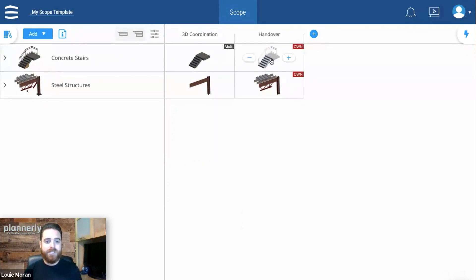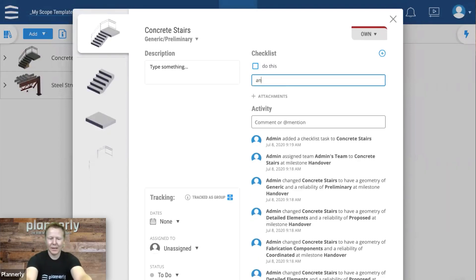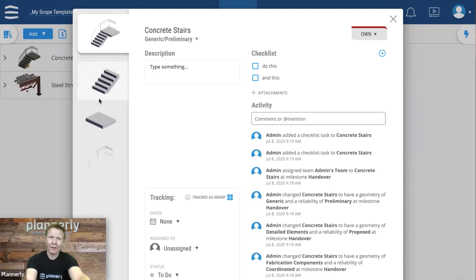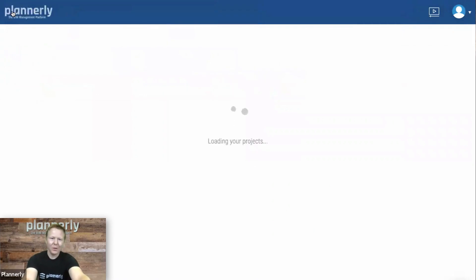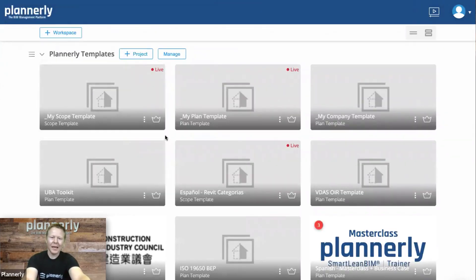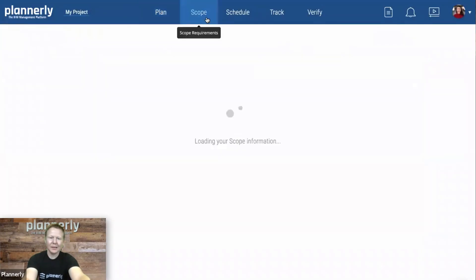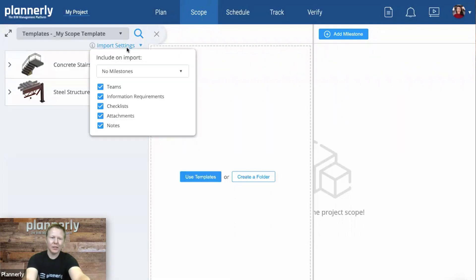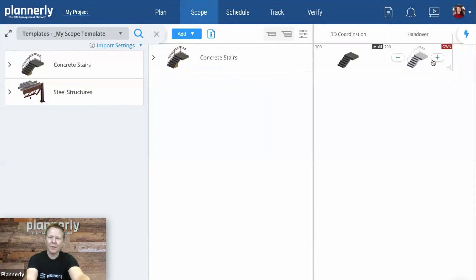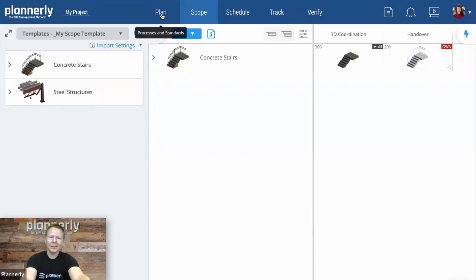Another best practice is keeping a simple scope for the BIM uses your team provides. Consider them as services — if you do 3D coordination and have a typical handover delivery milestone, include that. But if you don't do structural analysis or AR/VR, don't include those milestones. Keep it as lean as possible so you don't end up with too many tasks or over-modeling. Then set that scope template live and Michelle can access it in her project, dragging and dropping milestones to populate her scope.